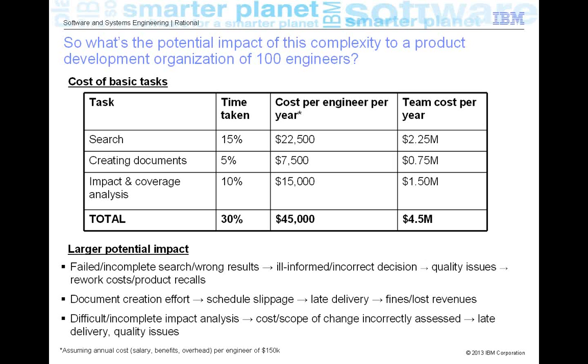For example, does the requirement have a related test case associated to it, or if I change a particular requirement, what test cases would need to be changed, what design elements need to be changed, what of course are the hardware changes, what of course are the software code changes.